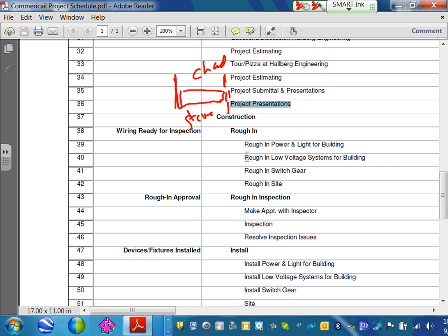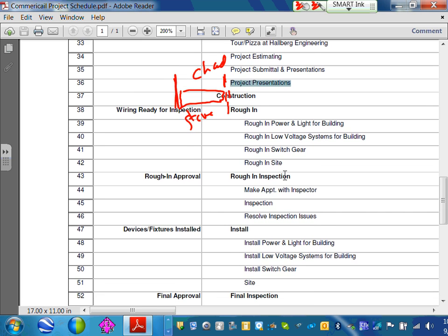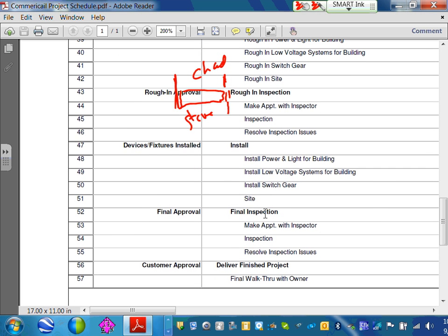The construction typically is divided into a few phases. Okay, the first phase is rough-in, inspection, installation, final inspection. Four phases for your construction, typical. Again, it could be more or less. First, you do rough-in. Do you guys know what rough-in is? They put the conduits and boxes, rough them in, and pull the wires. They leave the devices. And then later on, after the sheetrock and paint and so on, they come and put the devices and the lights and what not.